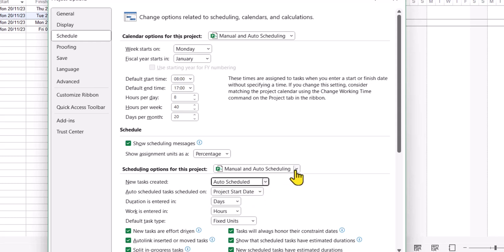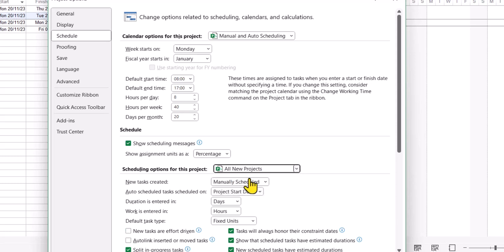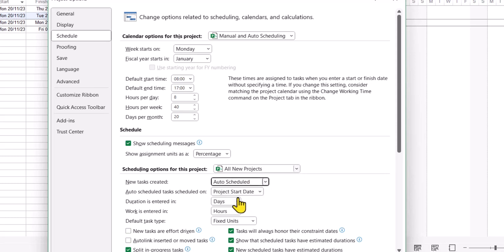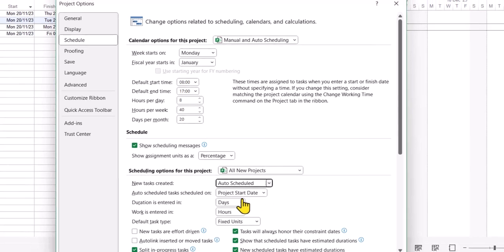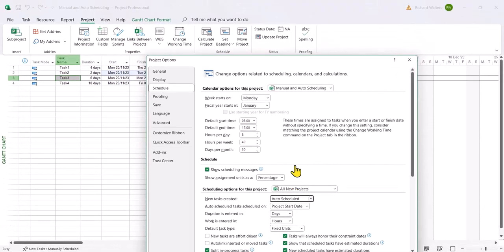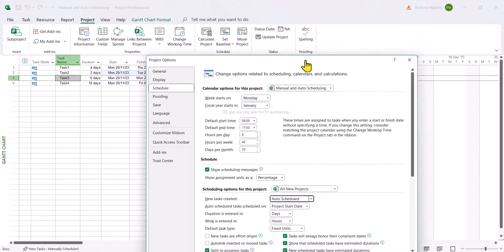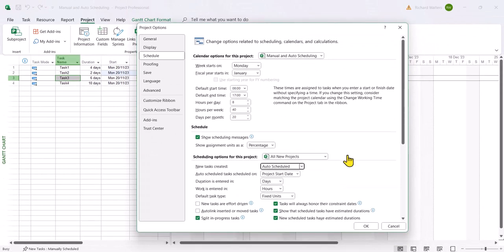But if you wanted to make it the default you could choose all new projects. If you do that just make sure because sometimes it changes back to manual scheduling, just make sure they both look exactly the same so all new projects and auto scheduling is now matched up and that's now correct. And this would then update all future projects to be auto scheduled and being able to have all the nice automated features. This completes the demonstration on manual scheduling and auto scheduling tasks.